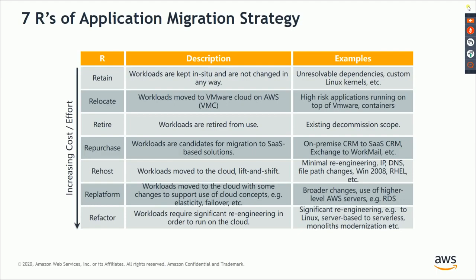So your effort should be to have more rehosting, as long as it does not compromise anything for the customer. And then leverage replatforming intelligently with a trade-off in mind. And then refactor, obviously, wherever there is a directive from the customer or there is a significant cost benefit achieved by refactoring. Sometimes that might be your entry point for the migration, and that cost benefit is something the customer is interested in, and hence considering cloud migration. So that obviously would be the case. But in a general sense, rehosting has a significantly lower amount of effort and therefore should be prioritized while thinking of the migration.